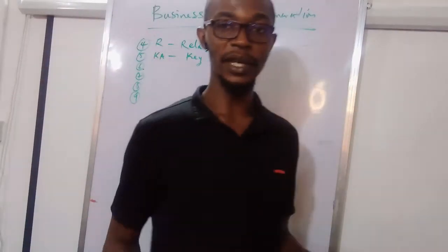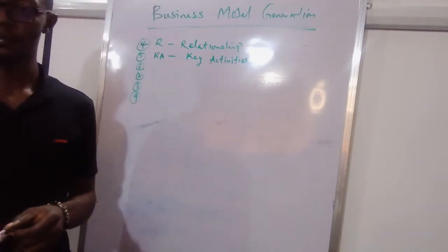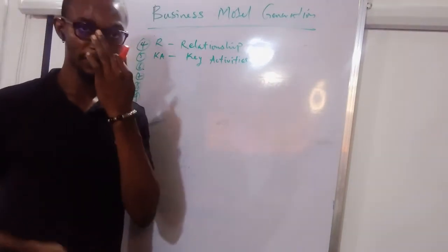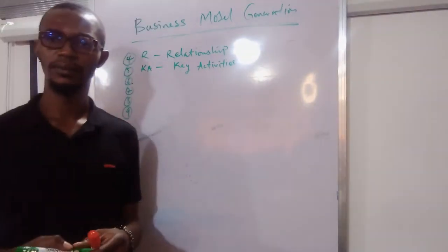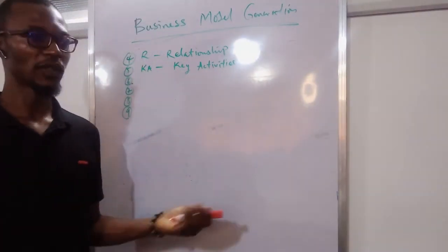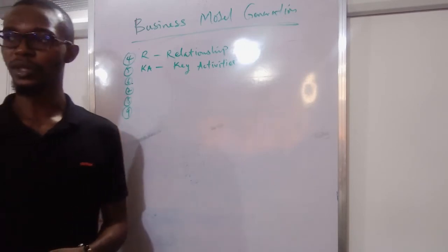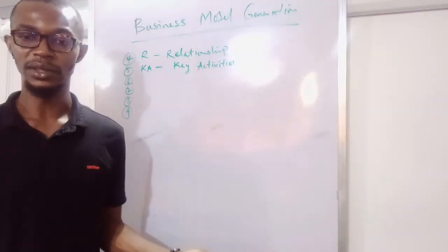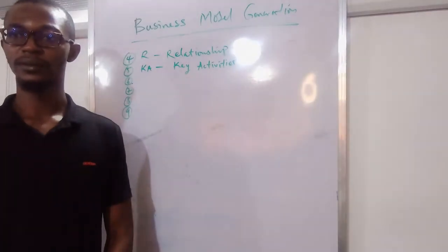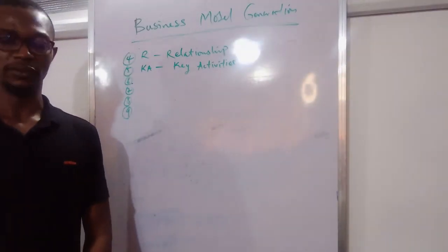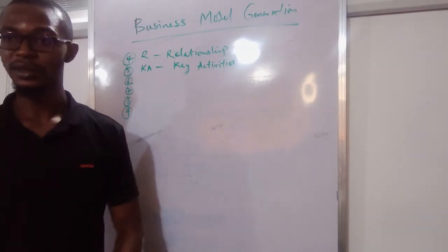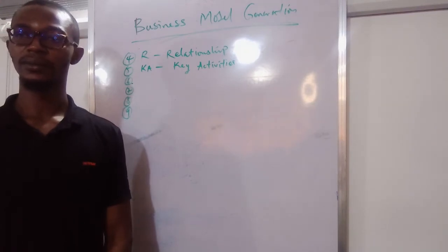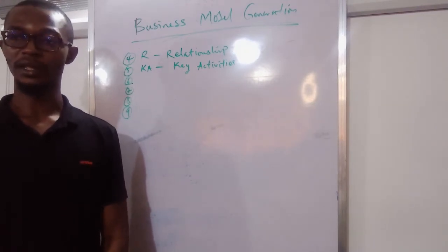Give me, for instance, the spelling bee. What are the activities you need to get done? The venue, date, time, materials, the panel of judges, the moderator. You're just mentioning components. What are the activities involved in that? You said panel of judges. What exactly does that mean? It's not an activity. Venue is not an activity.